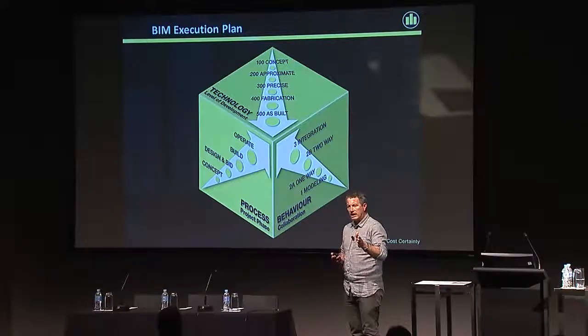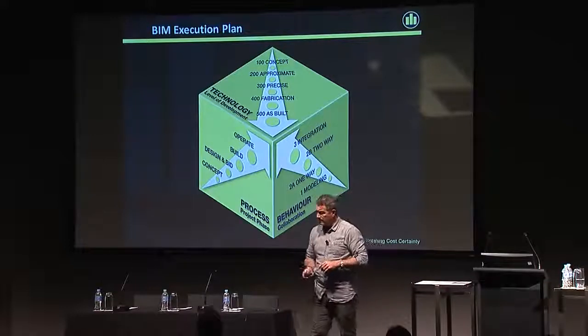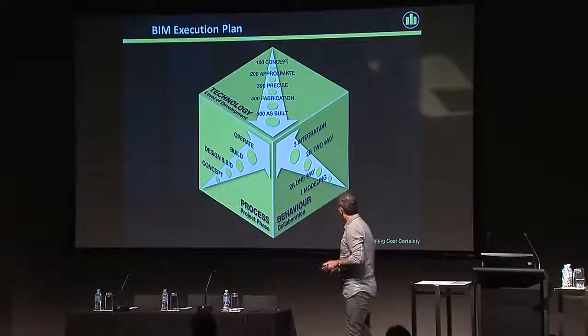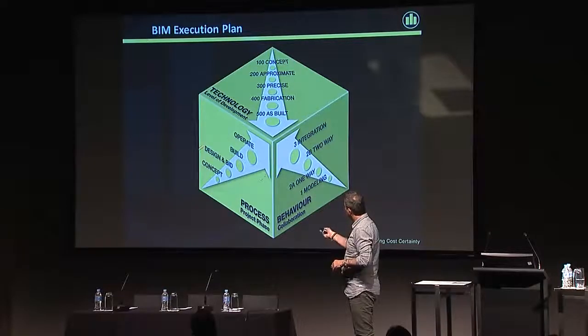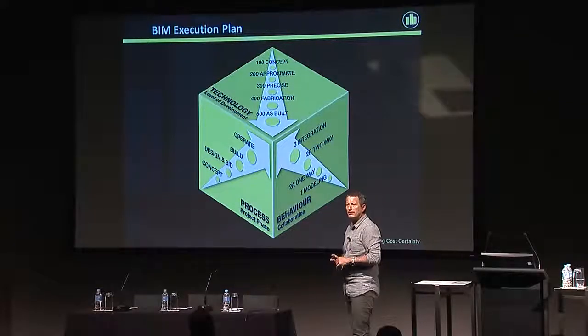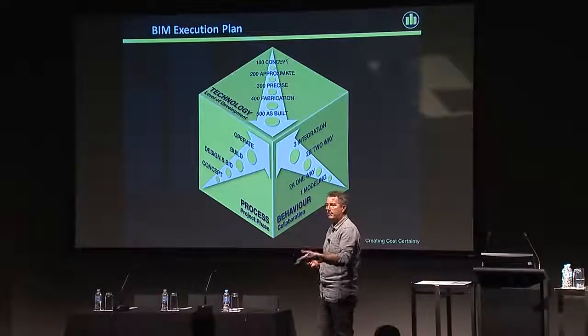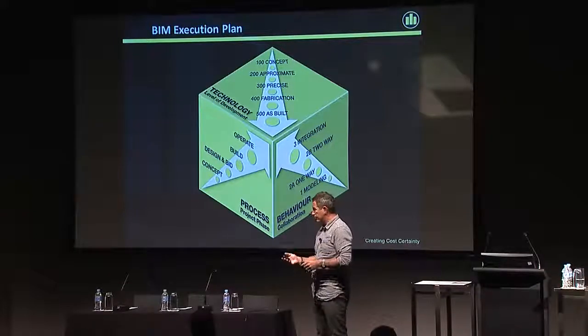Even to the sense where architecture leads structure. On all the projects I work on, we're letting structure way before we're letting architectural trades. So it's actually the structure that's ahead. And then the same in terms of understanding which part of the project we're applying this to. And that changes. So you write a BIM execution plan at the outset, but then as new actors come to the stage, you need to relook at what those skills are and then start to reset that BIM execution plan. And if that means that you need to pay people some more money to do things, I'd say pay them and get it done, because it will produce more certainty.